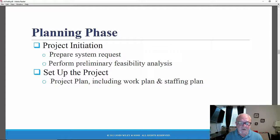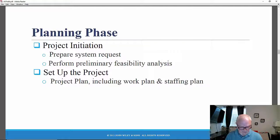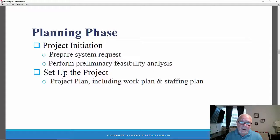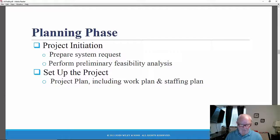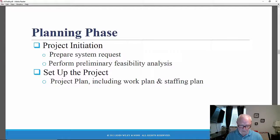Organizational feasibility asks: if we build it, will people actually use it? Will it be successful in its use? The system request is the key deliverable from the planning phase. Once a system request is approved, the project manager will develop a work plan, which is also a key deliverable.